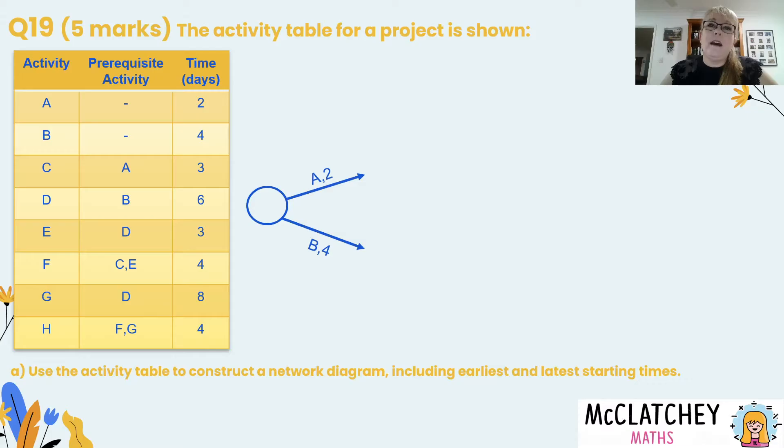We always start with a circle at the very beginning to show the start of the entire project and then branching out of there we have our activities A and B and we actually write on the edges the name of the activity and its duration. When the activity finishes we draw some new vertices in. So we've got started there with activity A and activity B.